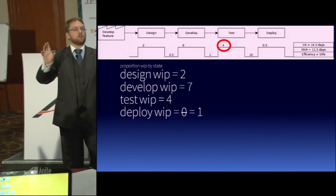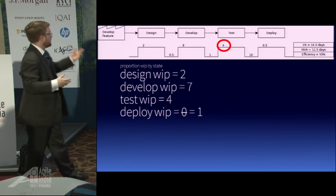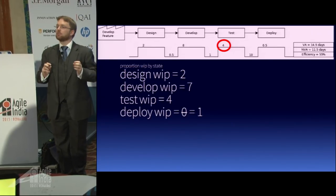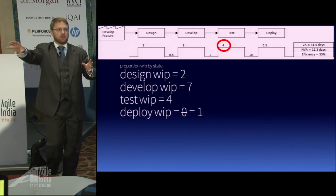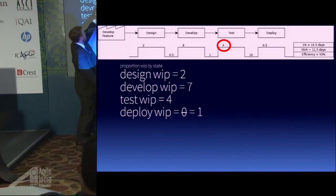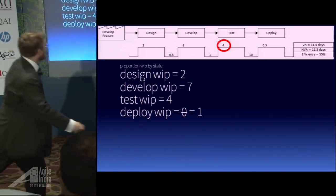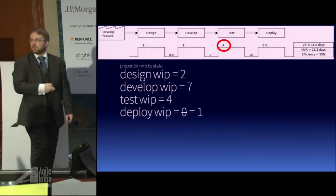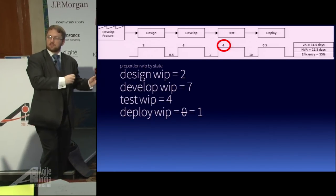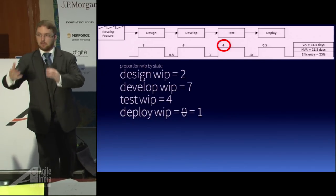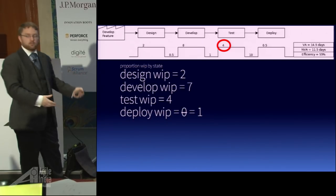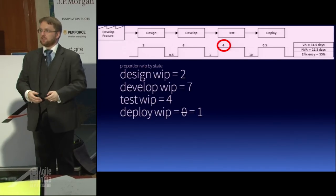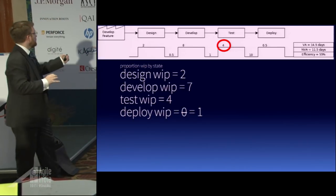Am I creating bottlenecks because my design WIP is two and develop is seven? Why is that not true? Because the pipeline of work is actually correct. Look at how proportionally much time we're spending on development versus design. Because we're spending four times as much time on development as on design, we can do four designs in the same time we can develop one feature. Because of that ratio, the ratio of resources is proportioned accordingly.